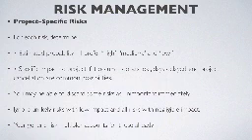So once you have identified, you will know which are your highest probable risks and which are your highest cost risks. So you will have to devise some methodology to mitigate them. For the risks you decide to handle, those that have higher probability and those that have higher impacts, determine some of the following parameters, such as transition indicators, mitigation plans, contingency activities, and your exposure to the risk.